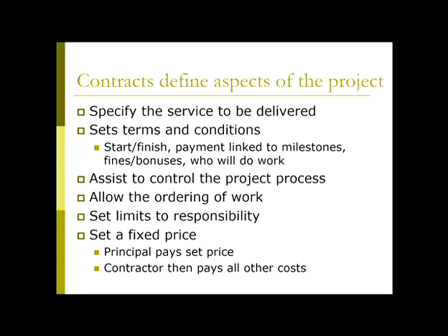It also sets limits to responsibility. So for a simple example, if you are employing somebody to build a house, they might say, right, we'll build the house, but we won't do the landscaping. So our responsibility is limited to building the house, but not the landscaping. And of course, that's a pretty gross cut.